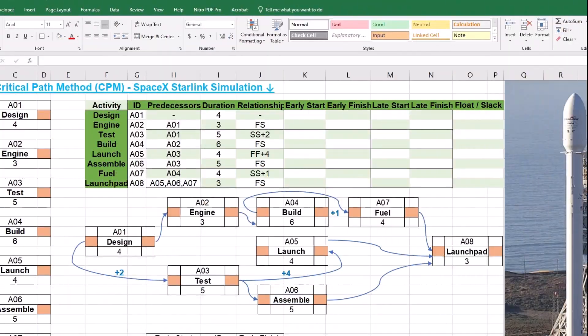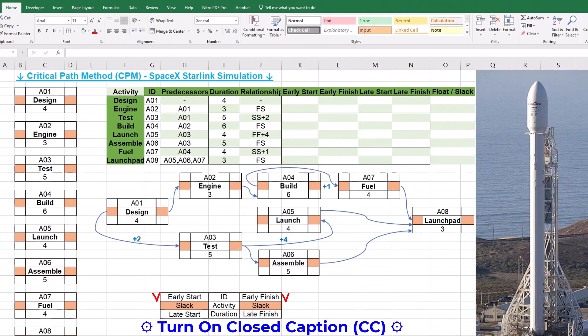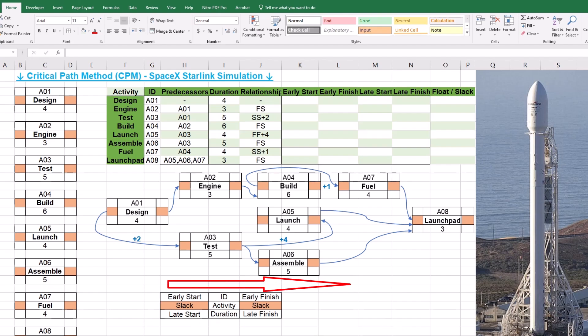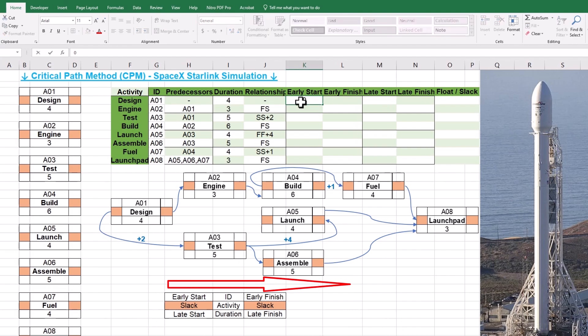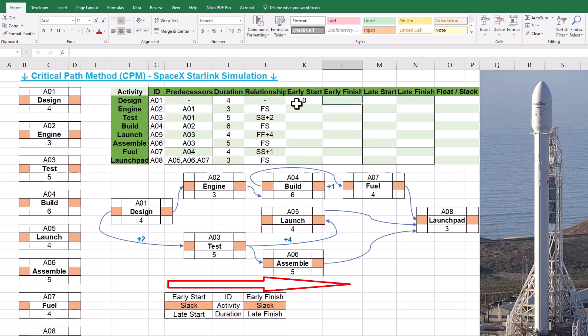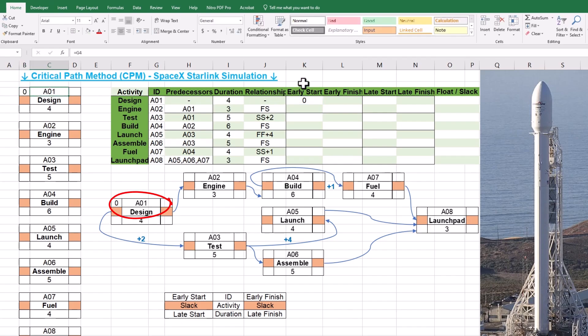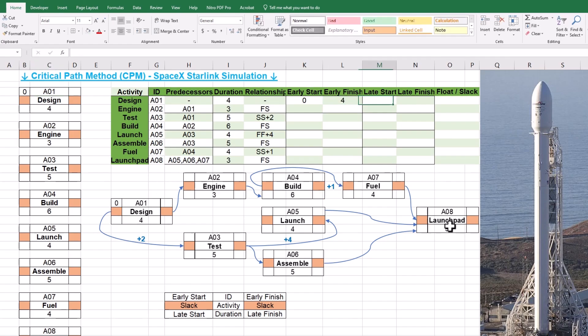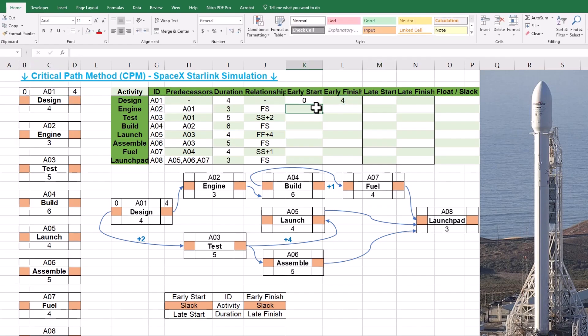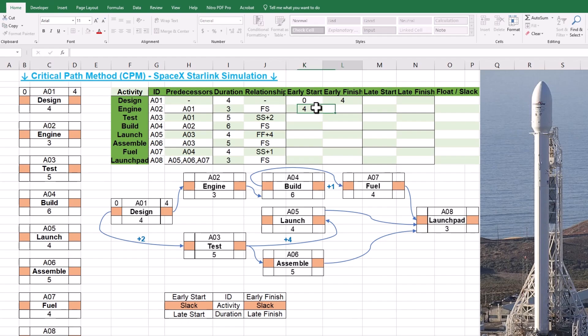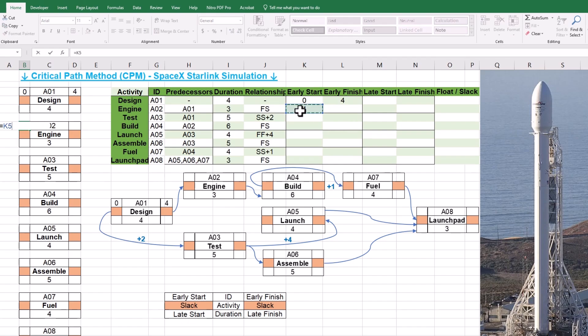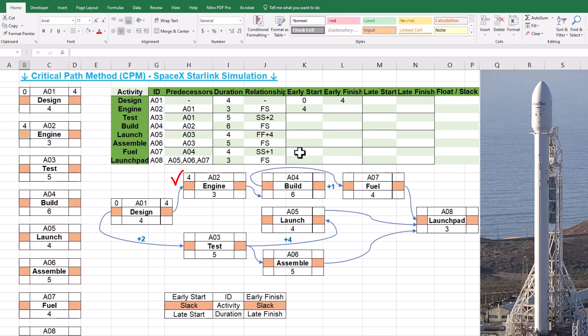Step 3. Solving the CPM and linking project data to our network. Early start and early finish dates of activities are calculated in the forward path on CPM when we move from left to right-hand side of the network. For activity A1, the start date is 0 and we should link it to our activity template on the left-hand side by referencing cell K4 in our project data table. As you can see, activity A1 is automatically updated in our network. Considering the duration of 4, the early finish date for A1 will be 4. The successor activity of A2 starts on the same date and we self-reference it in our template. This way, any future updates in our project data table will be automatically reflected in the left-hand side template and project network.